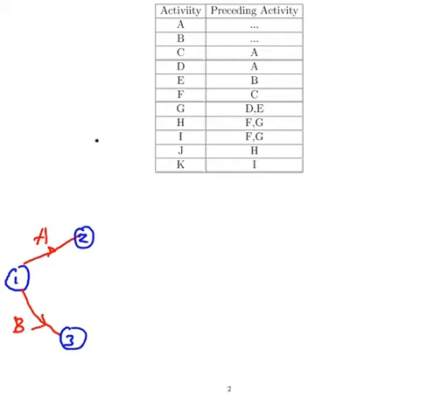So I have activities C and D. I'm going to look at C first. What activities depend on C? Only activity F. So what I'm going to do is set up a node here. I'm going to call it 4. And C connects nodes 2 to 4. Okay. And F is going to come out of that later. So I'm going to come back to F later.